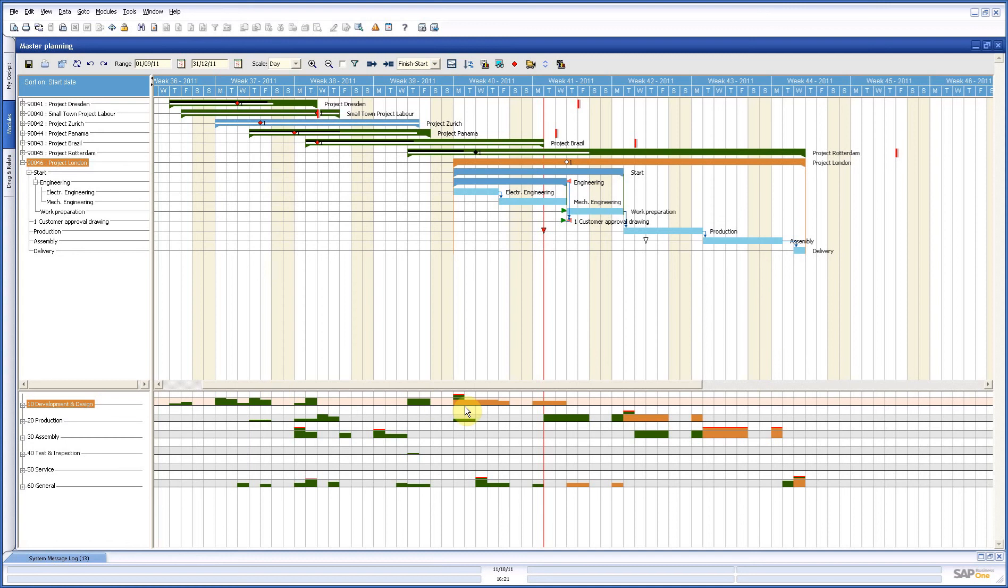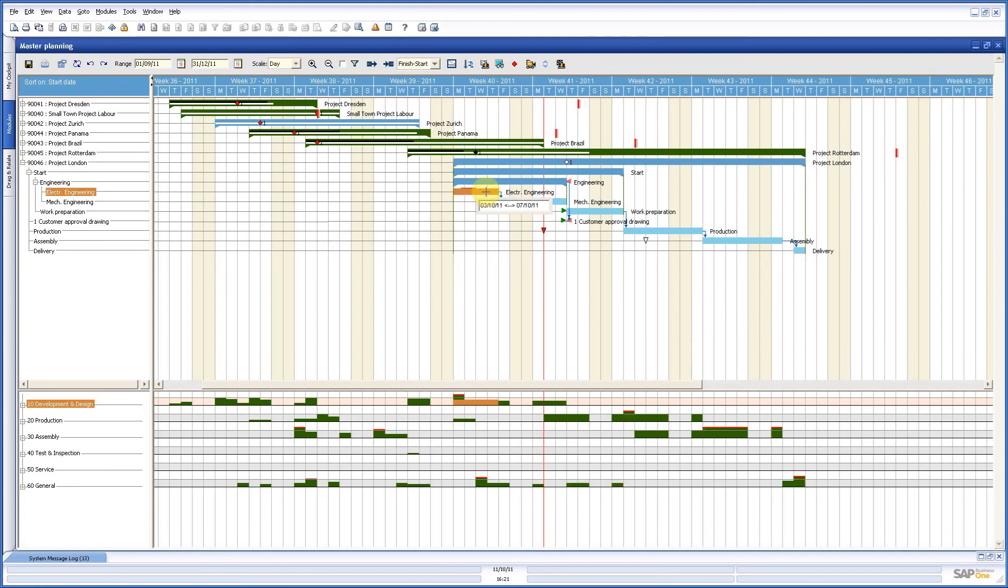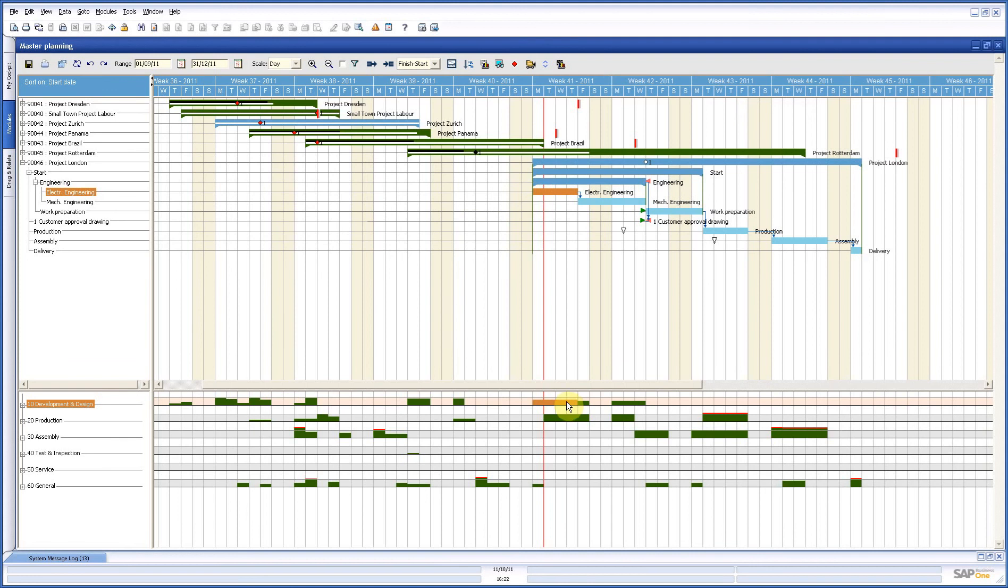Or, and that is what is needed in this case, you have to move around. Now, what do we see here? We see that you need capacity from this greenish project and from the brown one. So, if we pick up the brown one here and we move that to the right, then we see it is working. If we move this to the right, you see also immediately that everything else goes to the right. That is because of those blue arrows there.